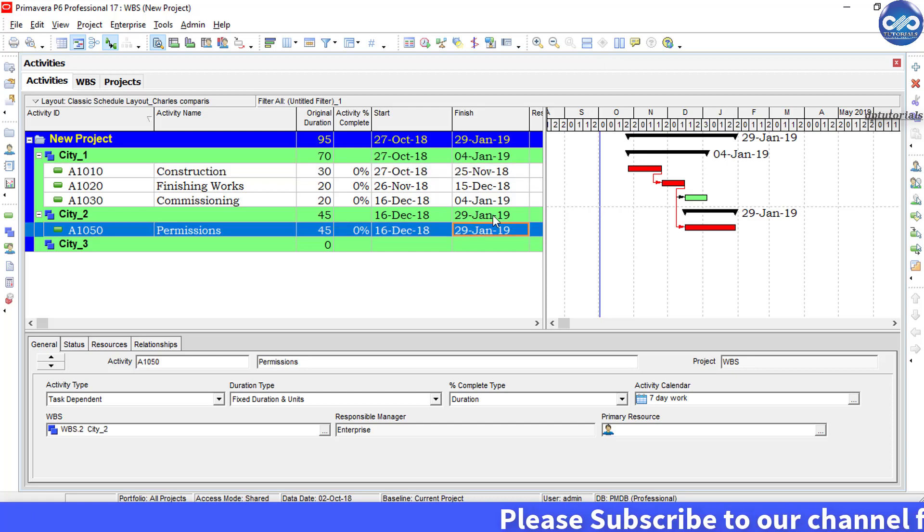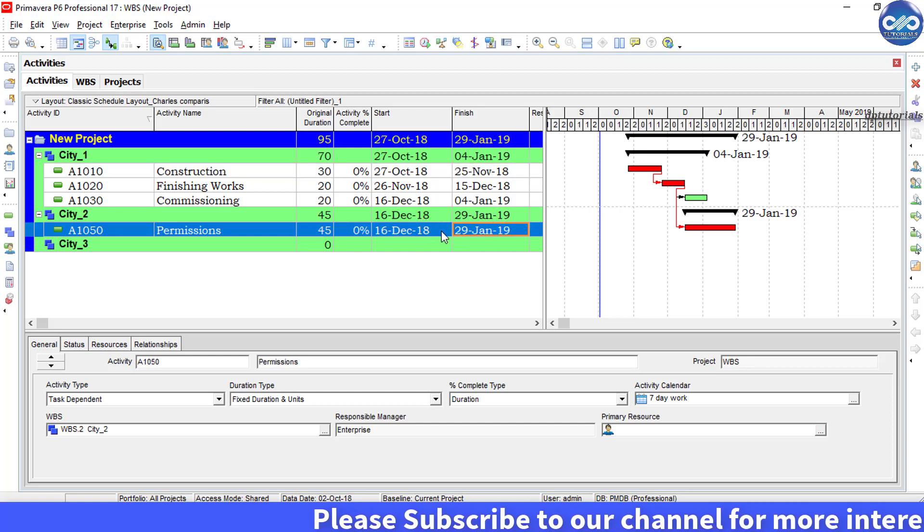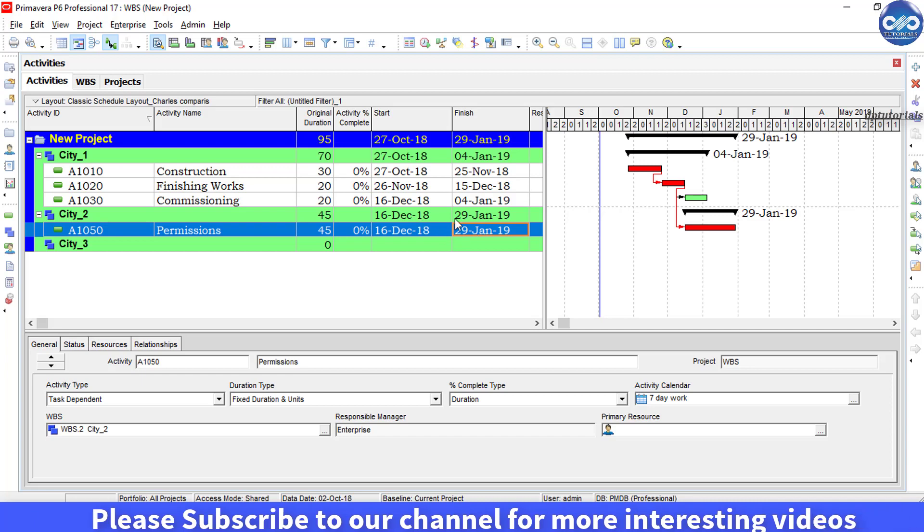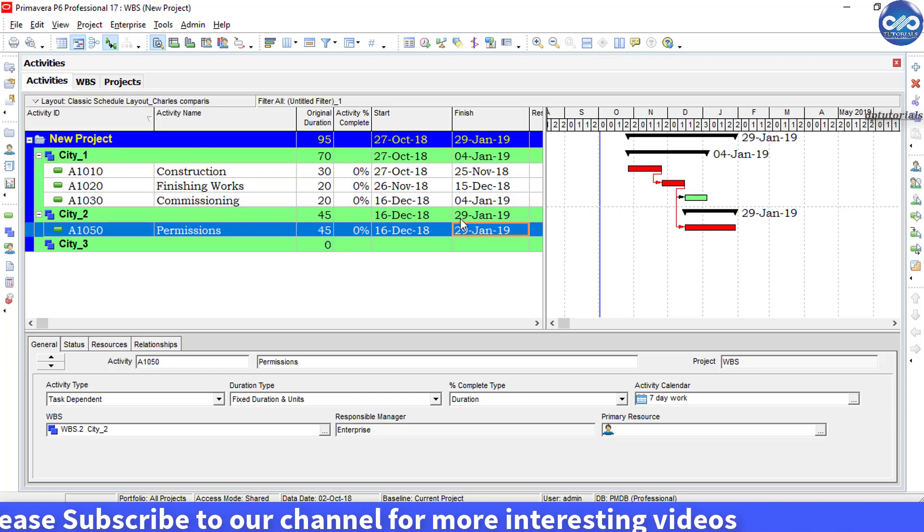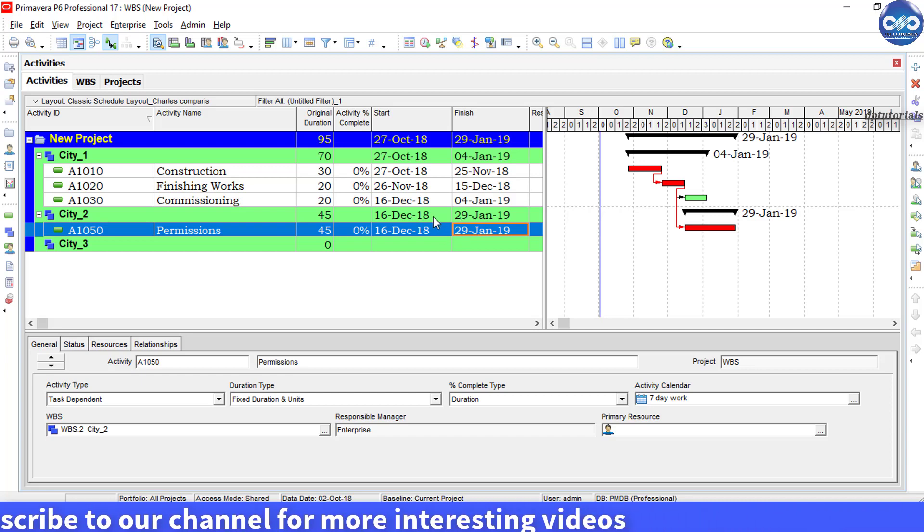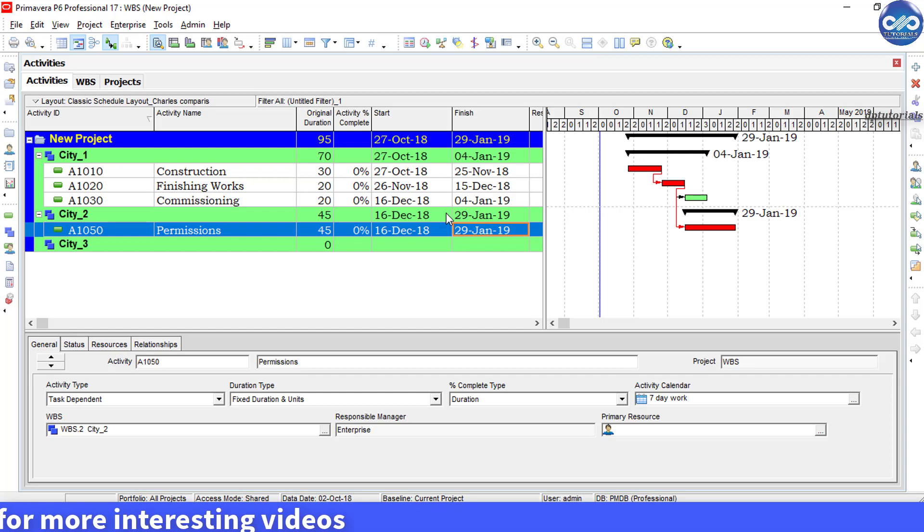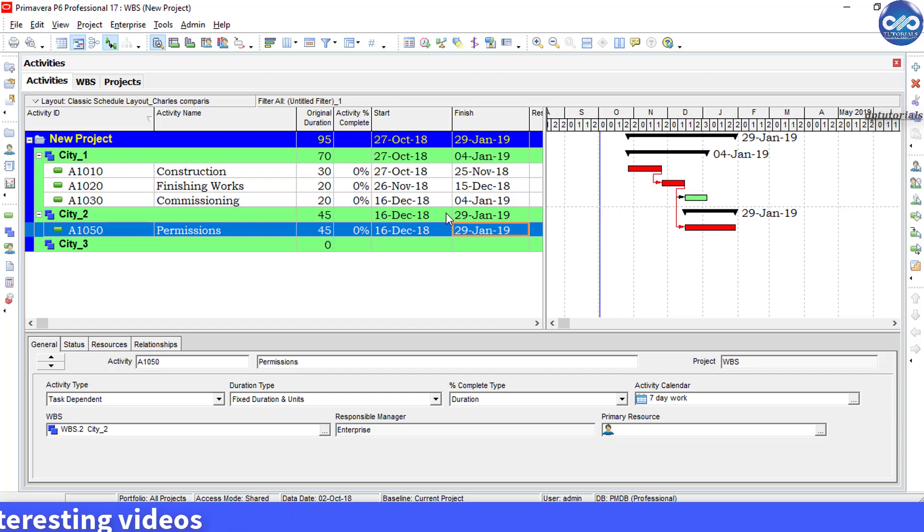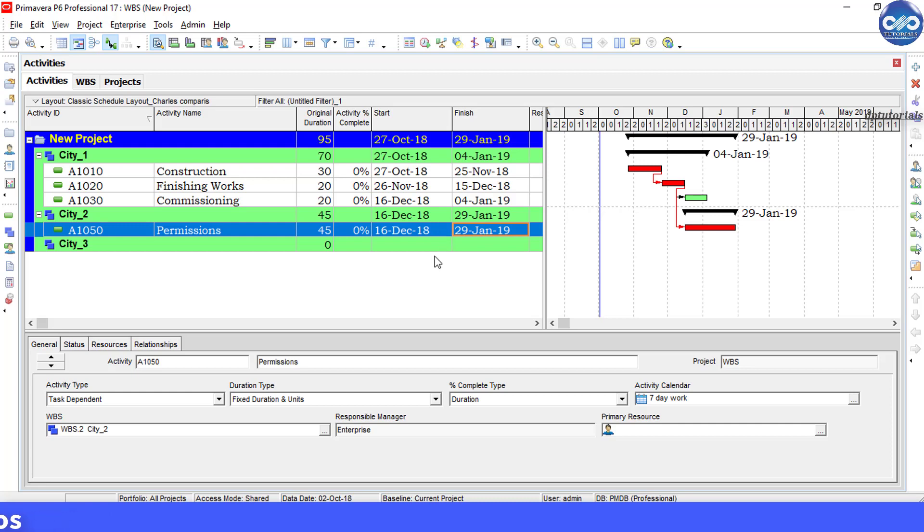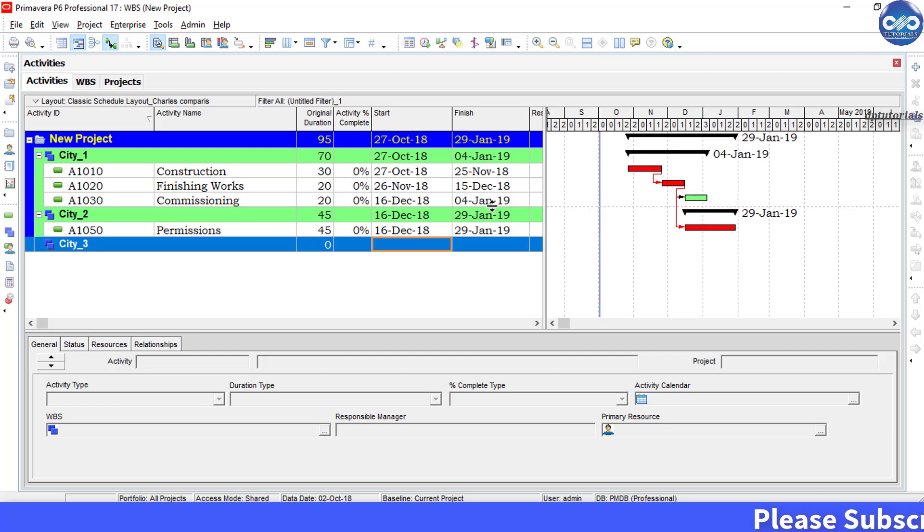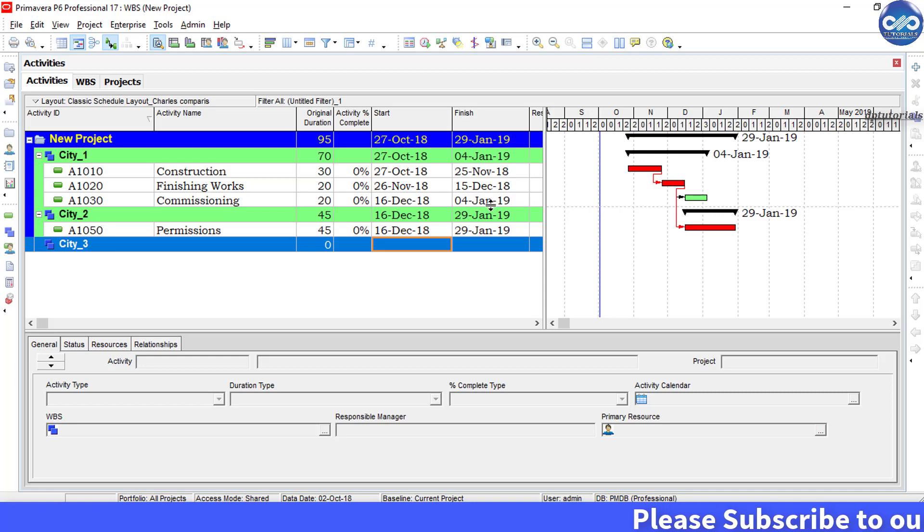The reason behind this is P6 will only show the activities that are being filtered, and this will be showing only the summary of the filtered activities rather than showing the original WBS. Even P6 does not provide any function to filter based on WBS.